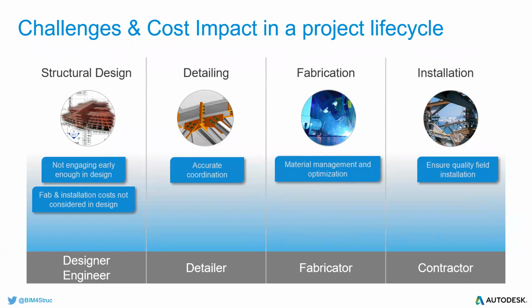So if the structural designer or the structural engineer do not engage the entire team at the early stages, that's likely to be a challenge or will result in an increase in cost. Also, the need to do prefabrication and installation may also result in maybe an increase in cost if there was no proper coordination and just proper understanding of the entire design process within the entire design team.